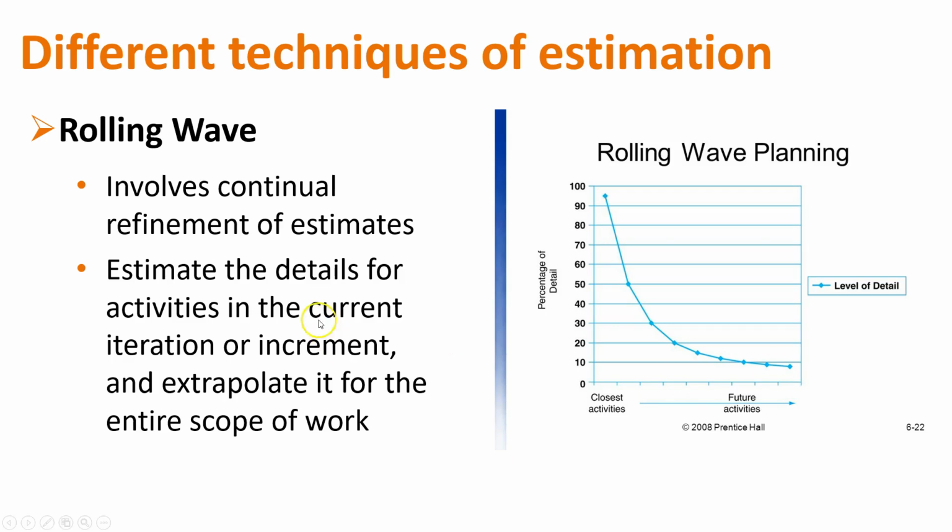So when you're doing that, you're trying to understand and refine your estimates as you go. This happens very much in Agile and adaptive. For those of you that have read the Agile extension, you'll know what I'm referring to. Agile, which is iterative and adaptive approaches to implementation, uses a rolling wave. Because as we start building out and as we start learning more, we refine our estimates associated with everything.